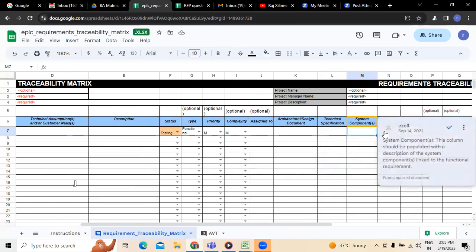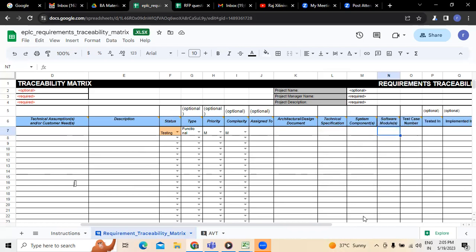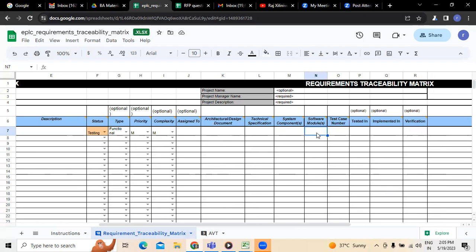Followed by this, we have to mention the module — whatever the software module we have, that has to be updated here, because project modules will be separate. At the same time, we need to mention the test case number — to which test case number this requirement belongs, because use cases are prepared followed by test cases. So whatever requirement we have taken, it will be aligned with some test case number prepared by the testing team for manual or automation testing. That test case number has to be mentioned here so that we can equate between the two. Usually we consider that if the test condition is a pass, the requirement was addressed by the team.